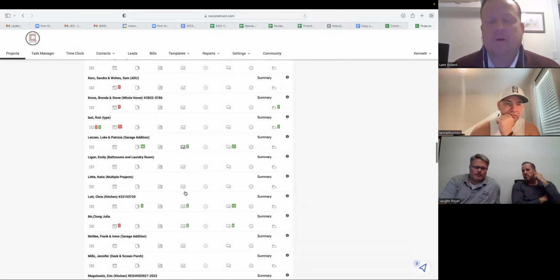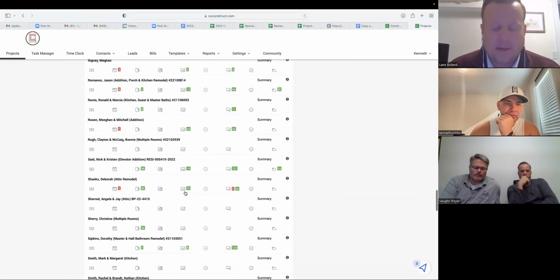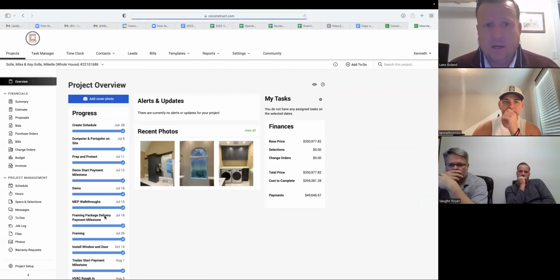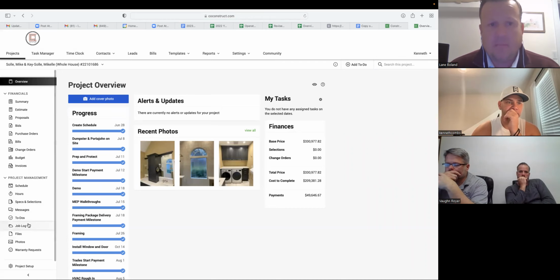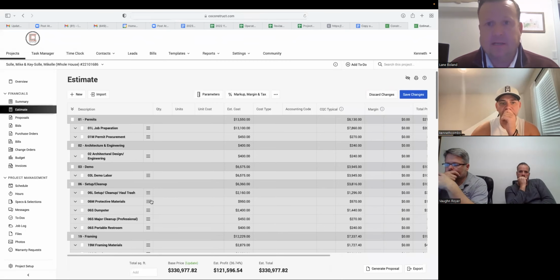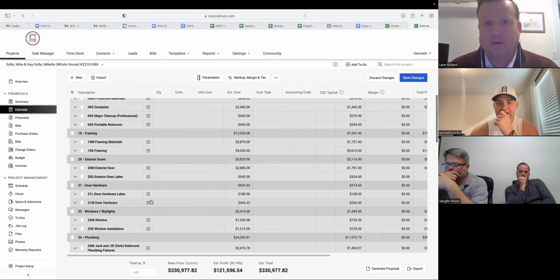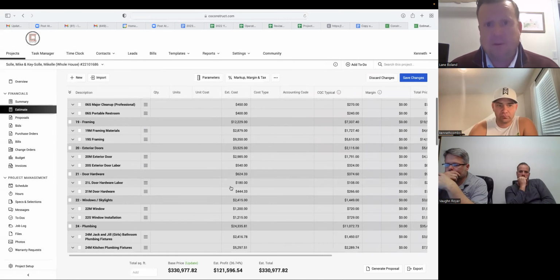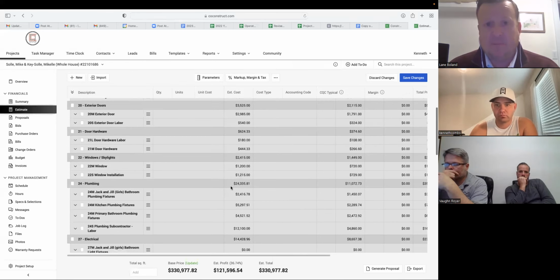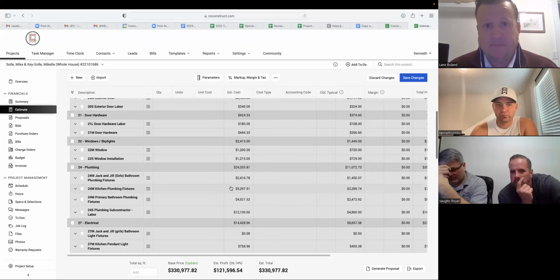So number two answers your question, Vaughn, about how do we tell if an estimate was underestimated or if it was due to, I don't want to say bad management, but lack of active management. It is to look monthly at the recurring slippages by line item across all our projects, historical and current, to see these patterns. And if anything's in slippage and it's happening more than twice, then that means we need to look at that problem, solve that problem with an SOP, and then roll that out to the company.